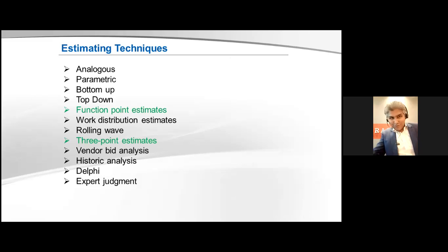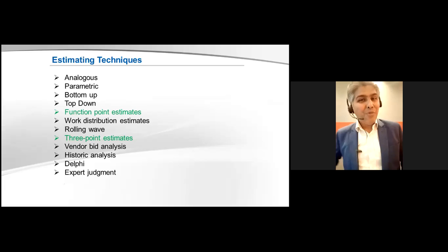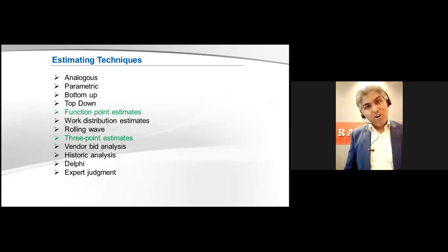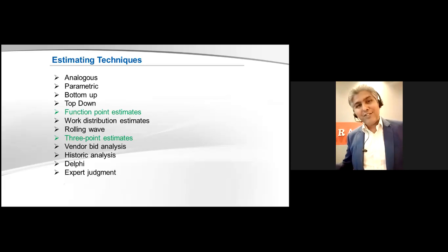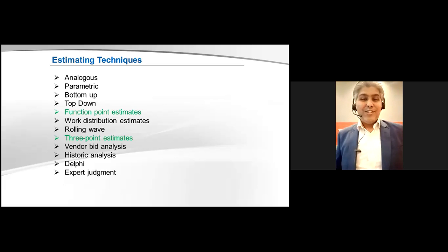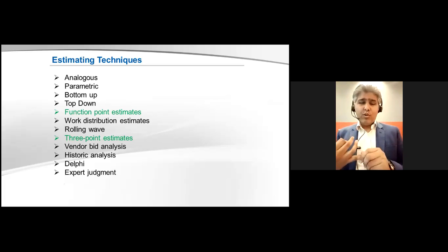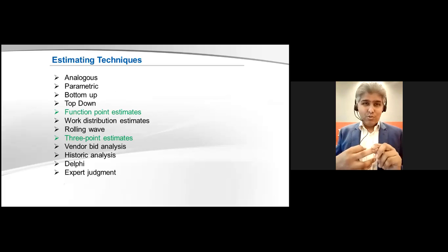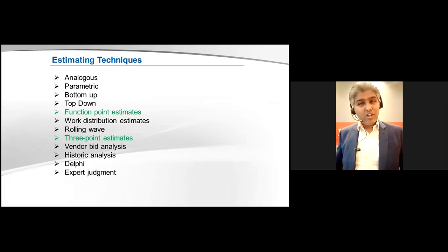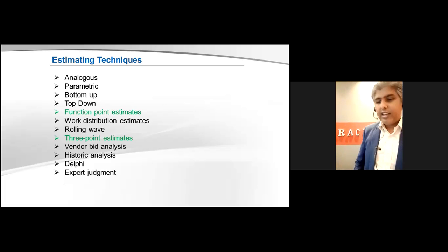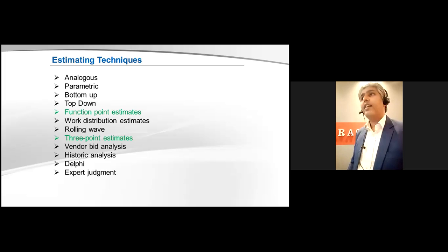So you just move this 2 and put it on pessimistic. The results you get will be more towards pessimistic. If you move that 2 from pessimistic and put it on the optimistic, the end results will be more towards the optimism. So this is the beauty. When you do the estimate, you take three aspects: optimistic, pessimistic, most likely, and then you make three different estimates. One more towards most likely, one more towards pessimistic, one more towards optimistic, and based on this you choose the best.